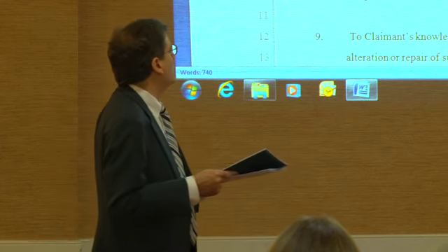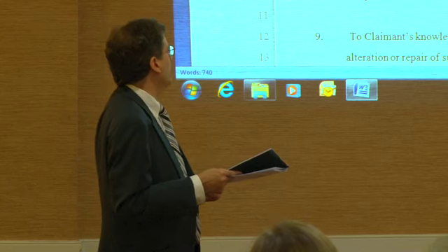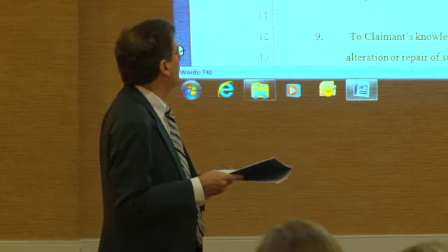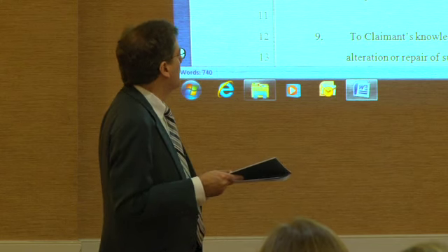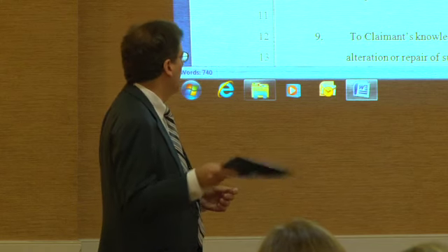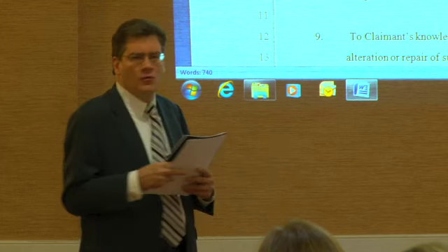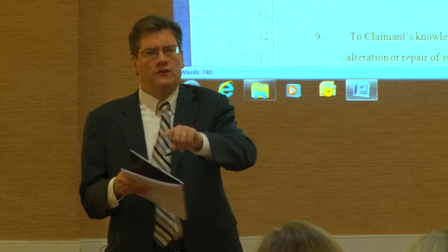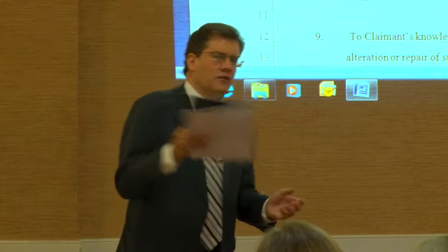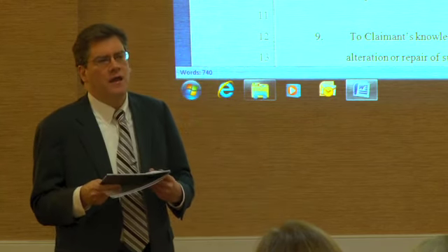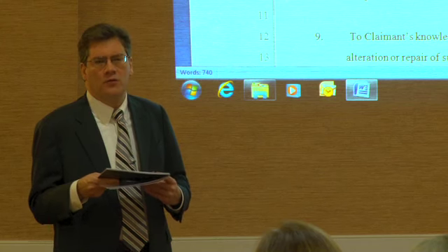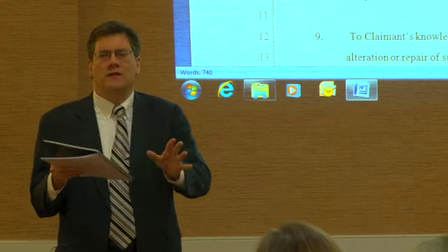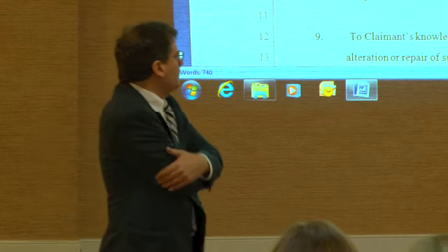Claimant demands, after deducting all adjusted credits and offsets, a dollar amount. This is what you're owed, plus reasonable attorney's fees and interest accruing at the highest legal rate applicable from the time of claimant's fulfillment of contract until paid. The legal rate that's applicable will be your contract interest term if it's stated. If not, then they just amended the Arizona statute, and there's some nasty 1 plus prime formula that you can use. Just have it in your contract, okay?